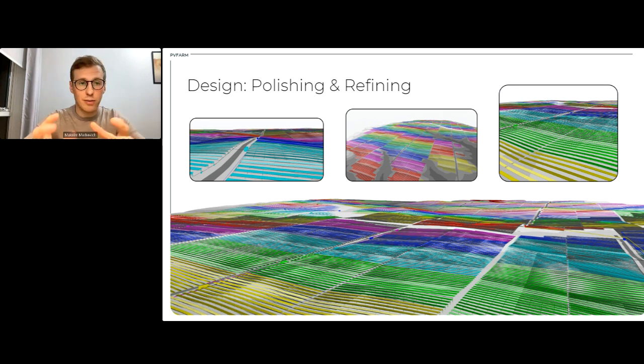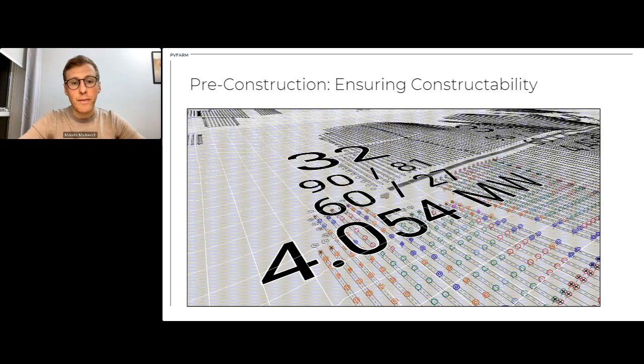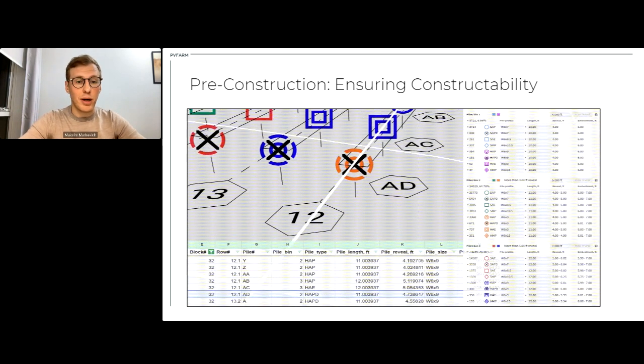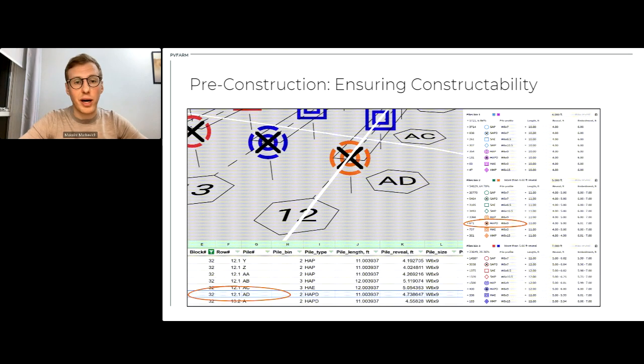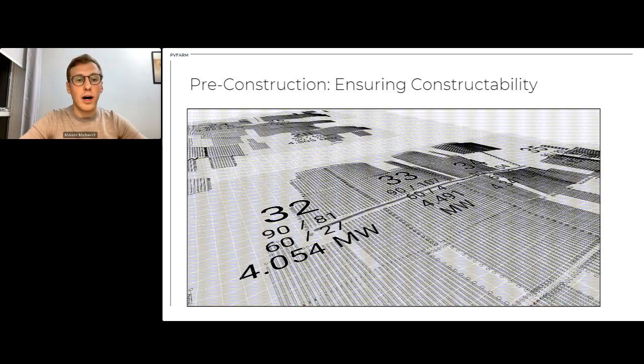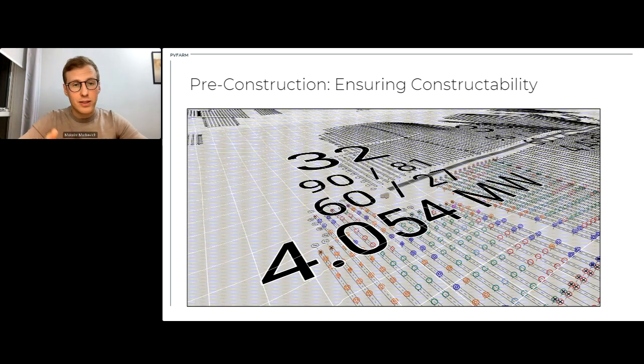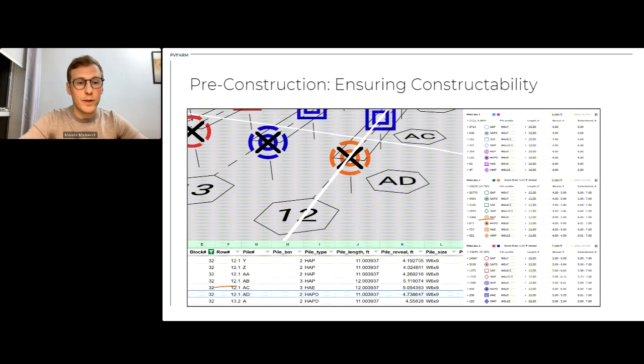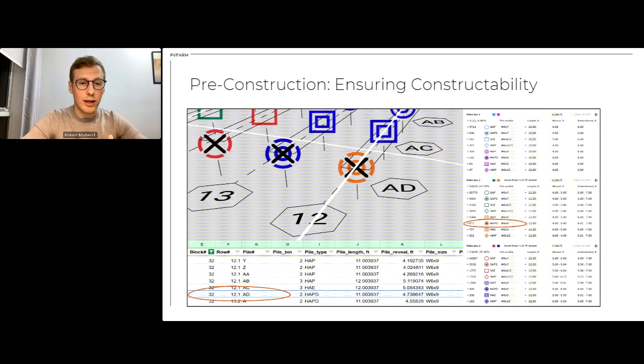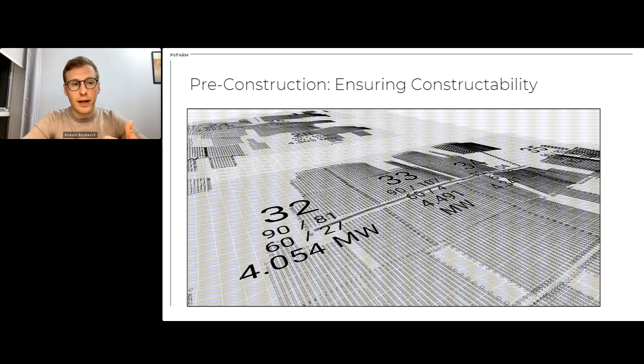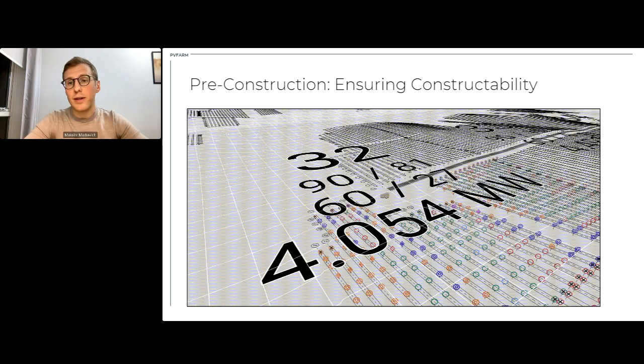And then the next phase is pre-construction, where you actually ensure constructability, thinking about piles. You want to have 20 types of piles, not 120. You want to have more and more thoughts about what you can deliver, how you can build it, etc. Right? So basically 7 phases.